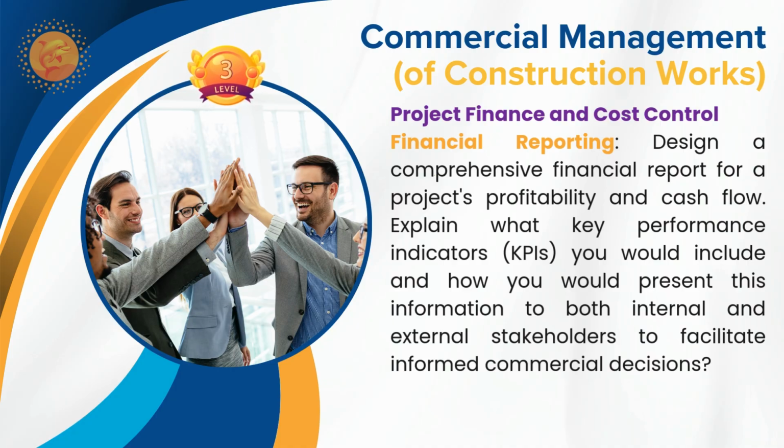Consider you only have 8% profit in your project. If the retention is 10%, where is the justification that you would be able to manage within the 90% of the certified amount which you are receiving, getting encashed during the interim payment? You also have to make sure how you are going to manage that.